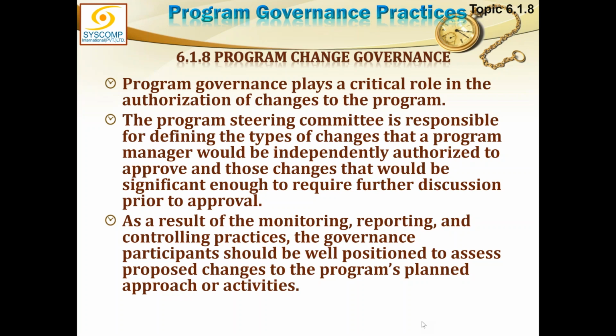So if something is to be changed, and interestingly, we do understand also that programs are more critical, but more uncertain. Therefore, there is a tendency of having more changes. But at the same time, there's a good thing about programs that they are not as detailed as projects or components. So the opportunity for detailed changes is not there. But naturally, the structure of the program may change. Like the roadmap may change, like your timelines may change and things like that.